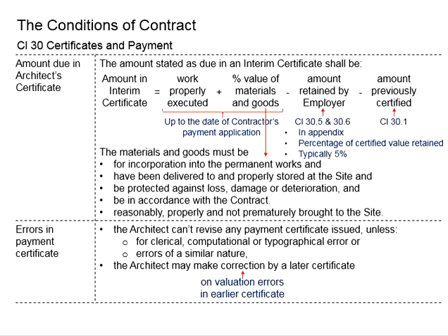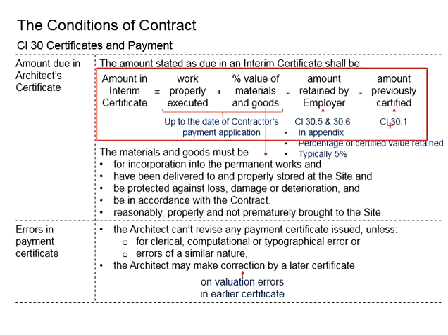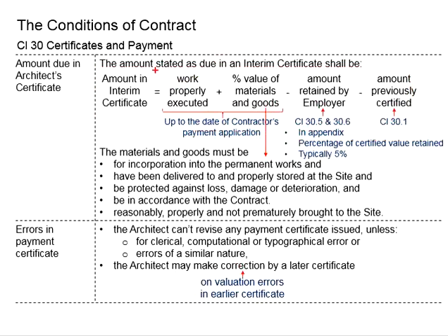This shall not be paid twice. You see, the quantification method here is quantifying the total amount of work that has been executed, and the amount to be paid to the contractor will have to minus those that have already been certified and paid to the contractor. The balance shall be the new payment entitled to the contractor.